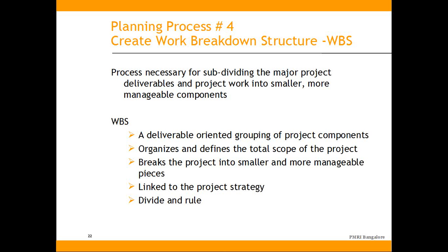And the first step in planning was develop project management plan. Second step was collect detailed requirements. Third step was define scope. And the fourth process is define work breakdown structure.